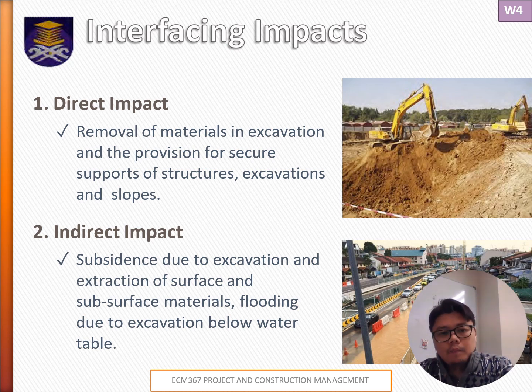The impacts faced during this investigation can be categorized as direct and also indirect. Direct impact refers to the immediate physical changes of the site through the process of drilling, boring, excavating, or the installation of monitoring equipment. For example, digging test pits could change the surface drainage patterns or disrupt the existing vegetation.